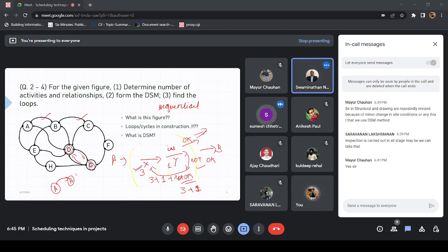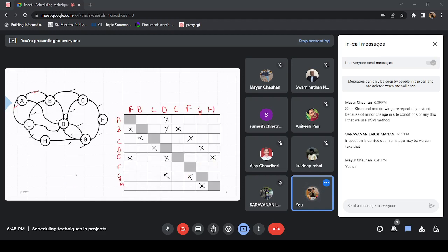If there is some loop in our planning, this is a place where we can get lost. So we need to make some assumption, or break the chain somewhere, to cross the loop. For that, it is necessary that we know what the loops are.